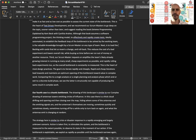How about hiring our competitors' head of engineering? Oh, that is difficult to undo. That will forever darken and sour the relationship further with our competitor, and it will change that person's life and their family's life. That's not quick to roll back. Okay, so that's a higher cost to reverse that experiment. And you create your backlog of experiments, and then you iterate through them in order, reassessing the system, seeing if your real-time analytics are changing the way you want.